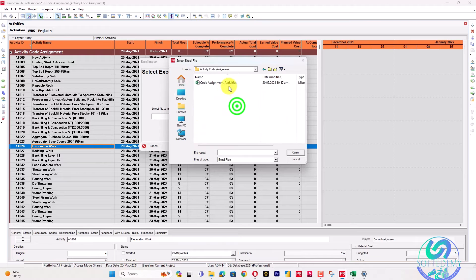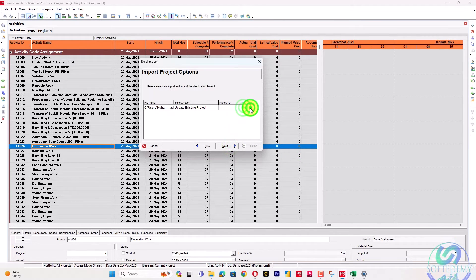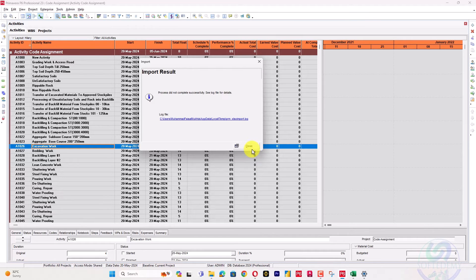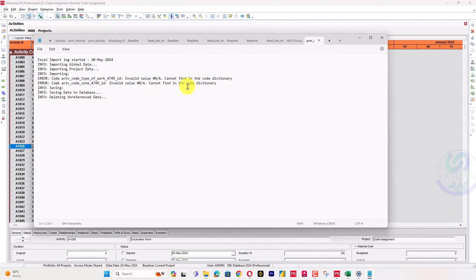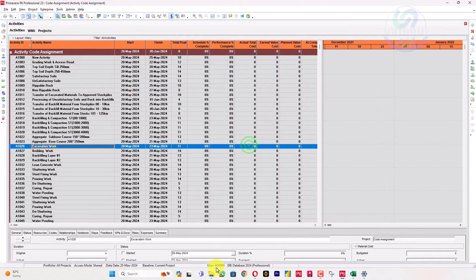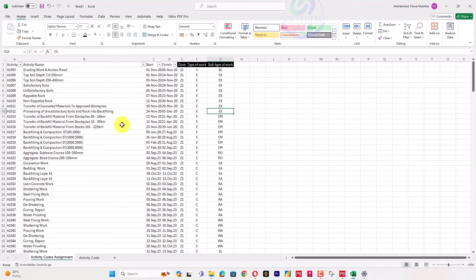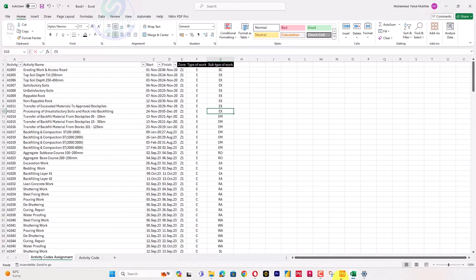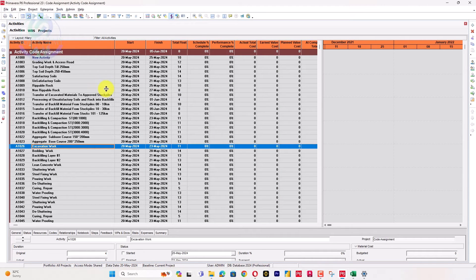Now I will open Primavera P6 and go to Import, select the XLSX file from the same location, import to the code assignment project, select the correct sheet, choose 'Update Existing', select the project, update activities, then finish. There is an error because one activity was not available in the Excel sheet — this is expected from the missing activity ID we noted earlier.